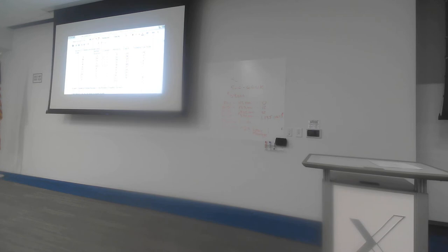So we can see a lot more clearly roughly how much it costs us to crash each of the different activities per day. Because I'm going to peel back this project day by day, I can see the cheapest activities that I can crash first of all. If I look at all of those different expedite cost slopes, I can see one that stands out, which is activity G. It's the cheapest one to crash. And my first instinct might be to crash that activity G.